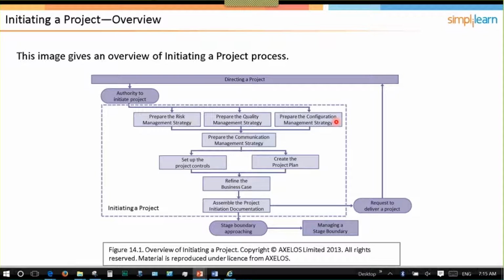So for example, many organizations have good configuration management around their software items and perhaps their hardware, but not so good on the documents side, like the project plans and like feasibility studies or process maps or things like that that might be produced throughout the project. So you would have to identify all the methods you're using to manage all of the product deliverables or project deliverables.